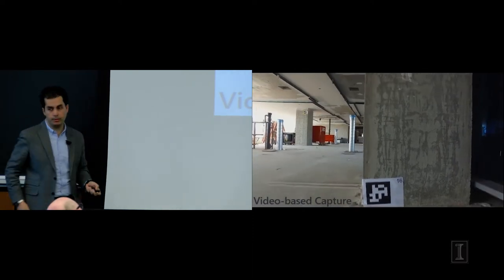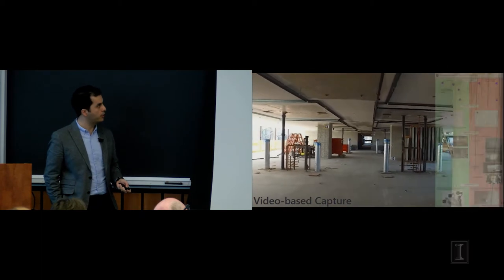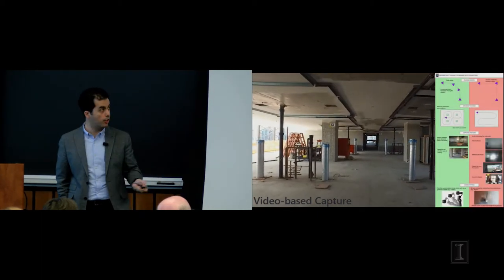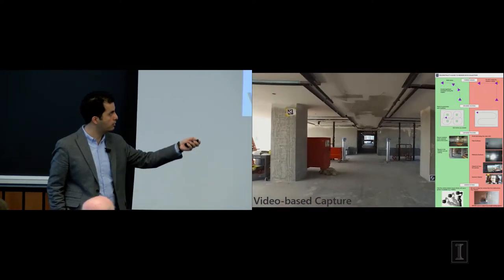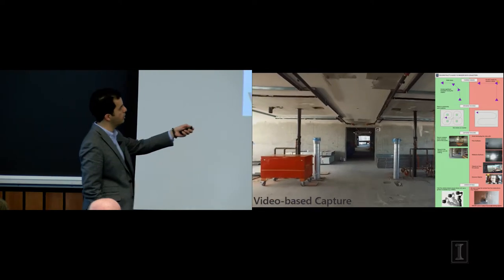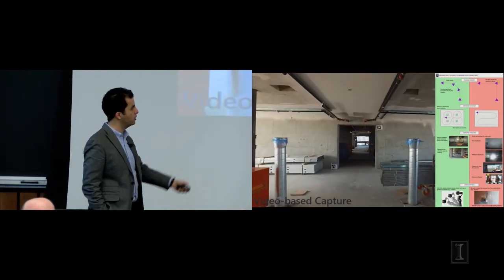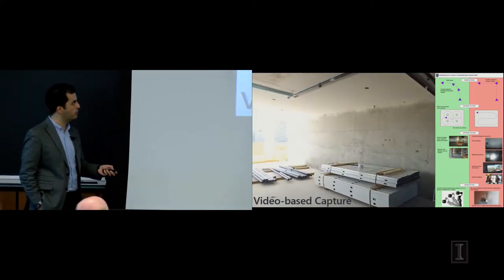So I'm showing you an example of this on a project. Again, this is a video-based capture. To make sure every worker would be able to perform this for us, we provide a guideline that is completely visual: what to do with a video camera and what not to do with a video camera when it comes to recording. You see, there are some markers that we have in the scene. These markers would actually help us make sure that the capture is complete and we can generate proper reality models.